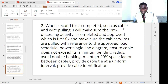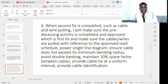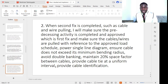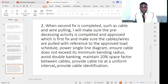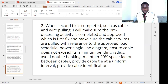For the second fix — when cable or wire pulling is completed — I ensure the preceding first fix activity is completed and approved. Cable or wires are pulled with reference to the approved load schedule and power single line diagram. I ensure cables do not exceed their minimum bending radius, avoid double banking, maintain a 20% space factor between cables, provide cable ties at uniform intervals as per the method statement, and provide cable identification as per the method statement or project requirements. Following these procedures ensures smooth consultant approval without obstruction.